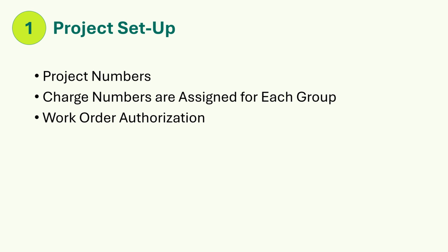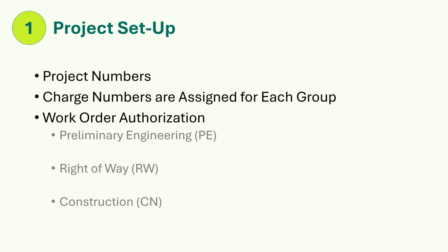You may need to delegate this to someone who is a work order expert. See the WSDOT Program Management Manual, Chapters 6.8 and 8.5 for more detail on this procedure. A separate work order is required for each project phase: preliminary engineering, right-of-way, and construction, and possibly for each stage within each of these phases.